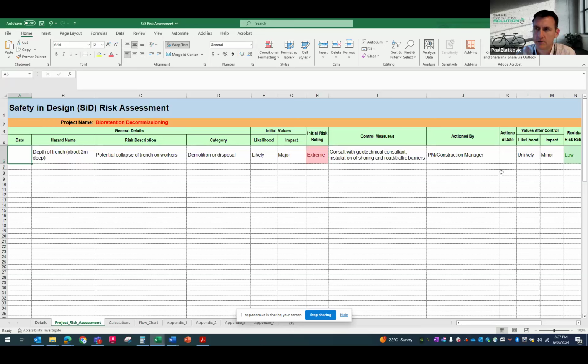So it is possible when we look at risks that we can look at a very worst case scenario and identify a very high consequence. I like the way that you've approached that. You said it could potentially be catastrophic, but the most likely outcome is a major impact in this case. It's something I meant to point out earlier: when we undertake a risk assessment, we're thinking about the most likely outcome, not necessarily the worst case potential outcome. So thanks for that. Did you end up thinking about another risk at all?